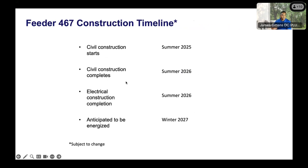For the civil construction timeline, once the contractor is awarded the project, construction is scheduled to begin in summer 2025. It should take about a year to complete. Following the civil work — installing all the civil components — the electrical construction will start, primarily pulling lines through the civil infrastructure, then ultimately energizing in the winter of 2027.